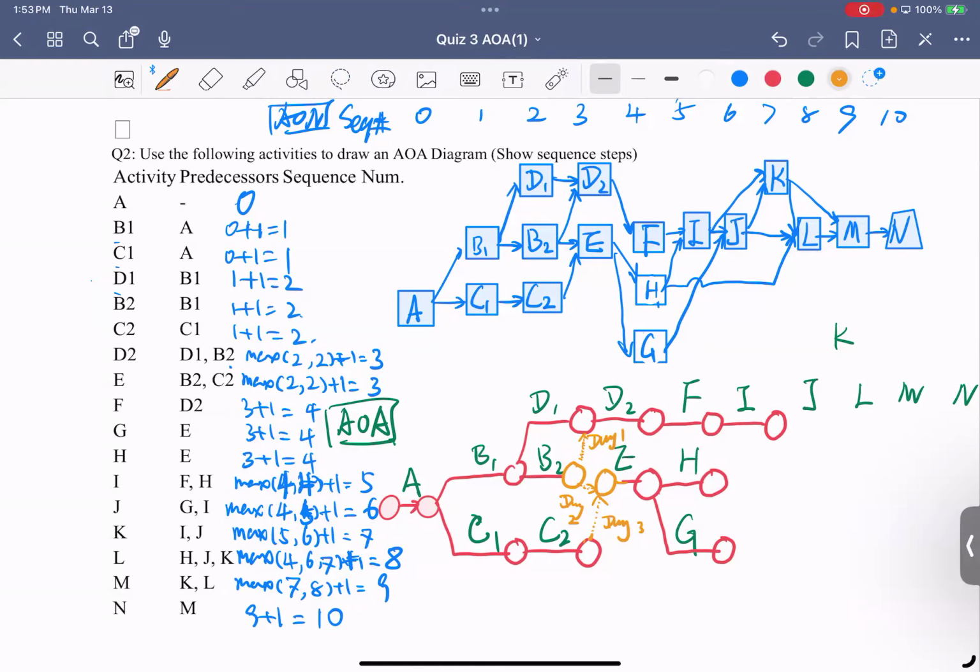Why do we need the dummy? Good question. We don't need a dummy. We do not need a dummy. We can directly do this. Can we do this? And this is your edge. Can we do this? It looks like right now there's no issue, right? Because no one will be going to share the same points. This will be different, this will be different to that, right? Question?